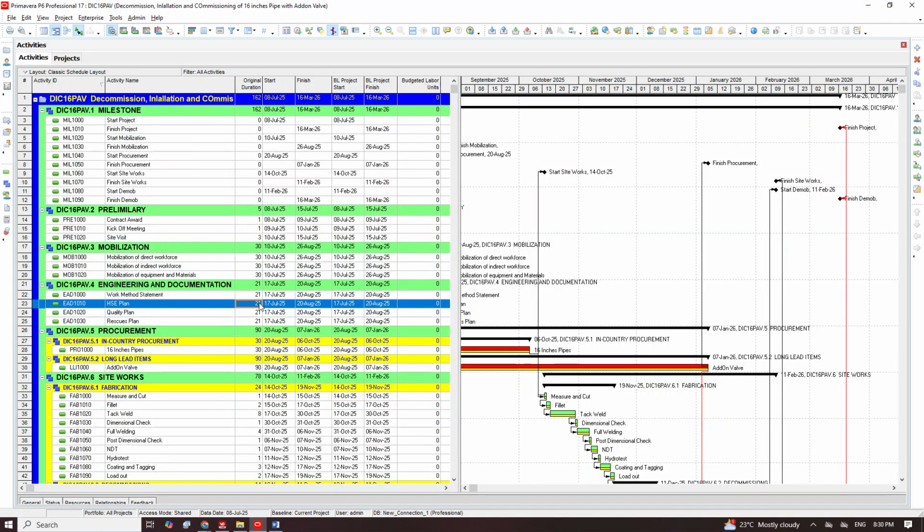You understand? And why you are knowing people doing it is you can also use that opportunity to verify if this 21 days is okay. Right? That's why it's good to know those doing it. When you know them, you can understand what we call productivity. What is their productivity? They have done these things in several projects. They know how long it takes them, right? You can discuss with them and say, okay, 21 days is okay, or it's too small, or it's even too big.